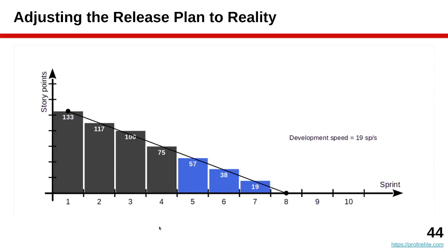Whatever it was that made you believe it's 23 story points per sprint, doesn't matter now that it's 19 story points. Maybe technical debt caught up with you. Maybe it's something else. It doesn't matter. The key is you have to work with 19 story points. So what you do is you change your plan for the remaining functionality, taking the real functionality as the baseline, and you plan and